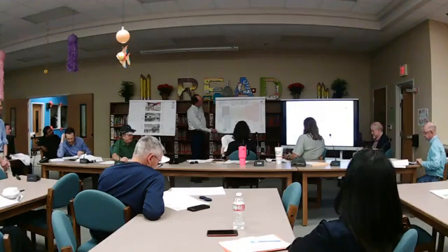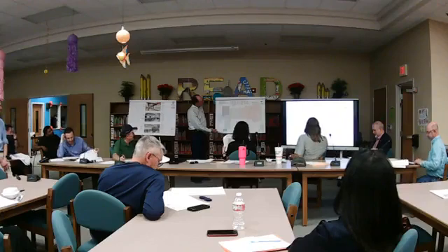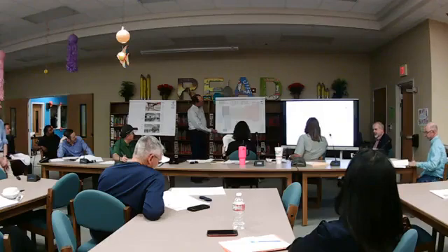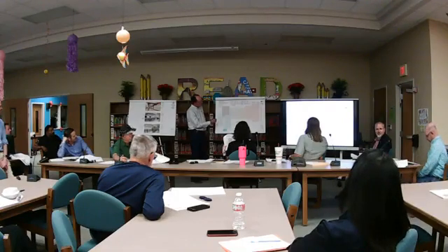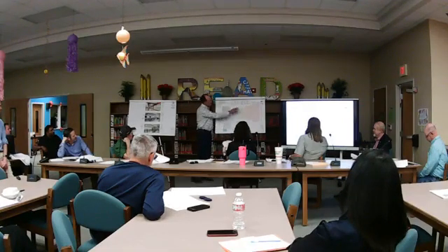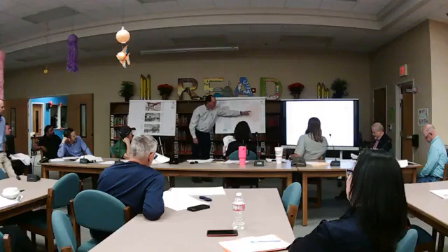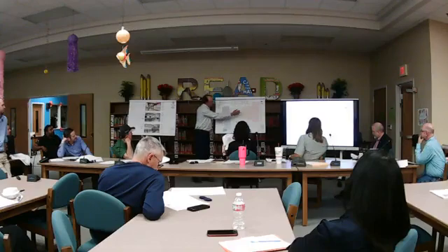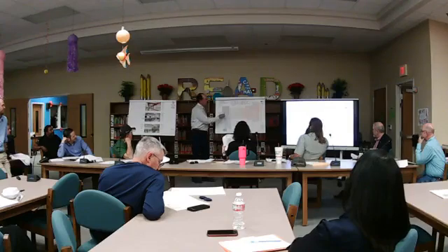Here's the lighting. We're reusing a bunch of the lighting that you've got. On the coves, we have those cost-effective indirect lights that you can't see, so they're replaceable. I think there are just about the right amount of lights to take out of the hallways. We're putting new lights in the hallways and using those to replace all the lights down here. You'll still have the old T8s, so as we do the hallway, we'll be moving those lights down, and we'll leave probably some of the existing ones there. Then as we get to these, we'll replace them about a few classrooms at a time.